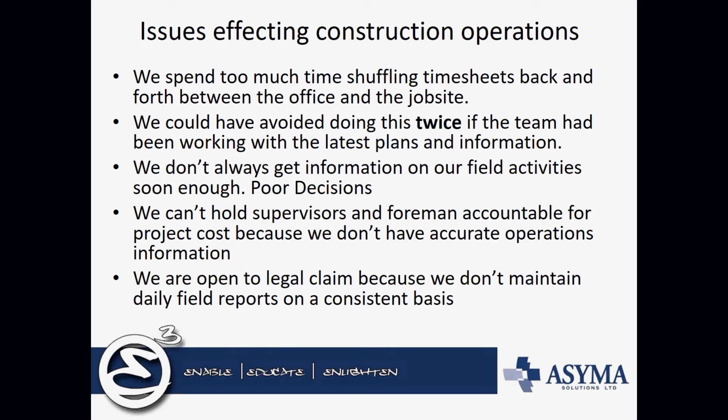The next one is we cannot hold our supervisors and foremen accountable because we don't have the information. The project costing lots of times is being done in Excel or outside the systems where it's all done manually, and therefore we just don't have it until we're all done and we've got it, and it might be a month or two after the job's done until you really know what the heck's happened. Well, how do you hold someone accountable when the horse is already gone? Yeah, you might be able to correct the next job, but the problem is we want to be able to do it as things are going wrong, or if things are going right, great. But at least if we've got the information on a timely basis, we can hold our people accountable for the work that they're supposed to be doing.